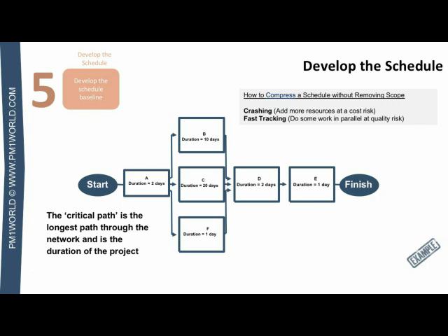This amount of time that an activity can be late before the end of the project is affected is known as total float.